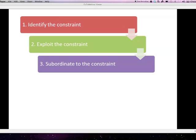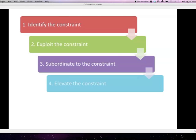But if this doesn't work, you might need to actually expand the constraint that you have in the system. And this is, as we said before, often quite expensive. If this is the development or maybe the testing part of your process, it's quite expensive to learn someone new to be the tester or the developer of your system. And therefore, if you could focus to exploit your constraints, it's actually often much cheaper. But sometimes you have to elevate the constraints. So you maybe hire someone new, teach someone else to do the stuff. And by this, usually you will, after a while, move the constraints to somewhere else in the process.